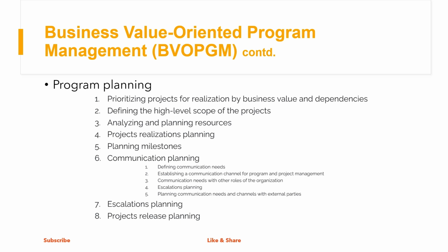Now, projects release planning. Projects release planning may include defining all roles involved in project releasing and their responsibilities, defining and describing the steps needed for every project release, defining resources, materials, and tools needed and planning their provisions, testing and analyzing the status of current tools, environments, and materials, notifying all potentially involved parties of the plans, procedures, tools, environment, and materials, potential training, preparing all documentation templates that may be needed, defining and planning post release needs and activities.